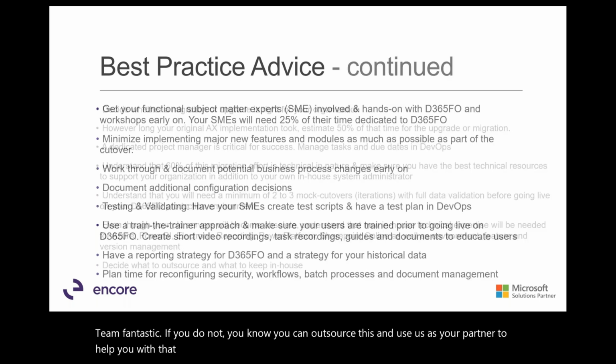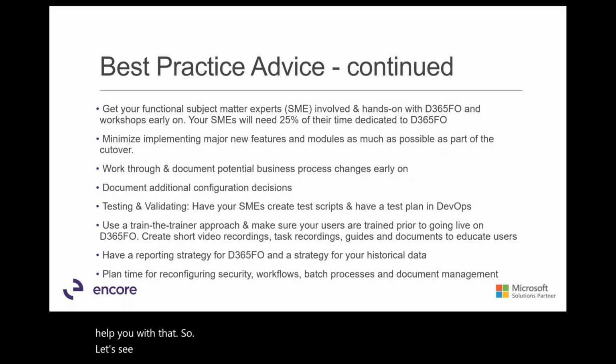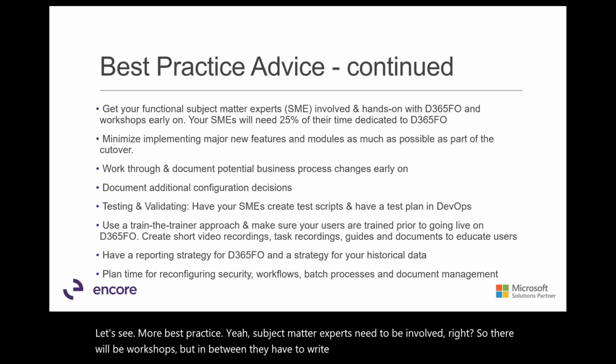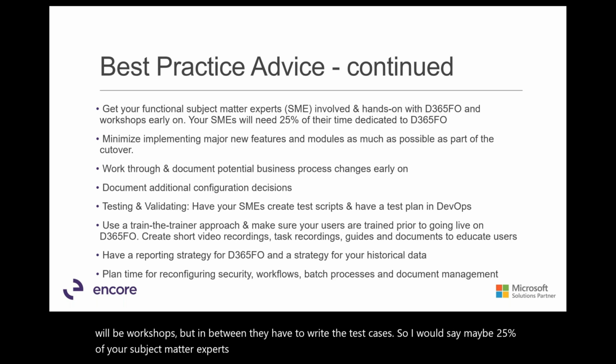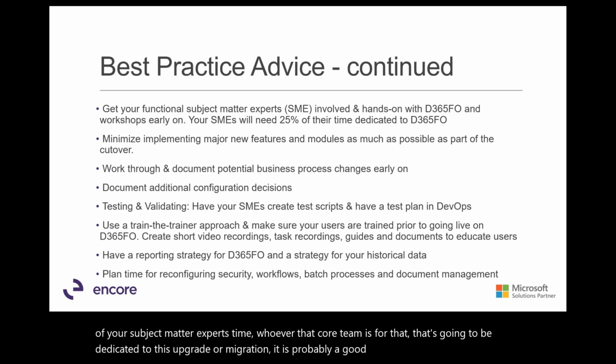So let's see, more best practice. Yeah, subject matter experts need to be involved, right? So there will be workshops, but in between they have to write the test cases. So I would say maybe 25% of your subject matter experts' time, whoever that core team is that's going to be dedicated to this upgrade or migration, is probably a good guesstimate on that.